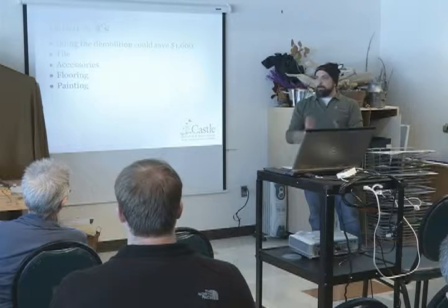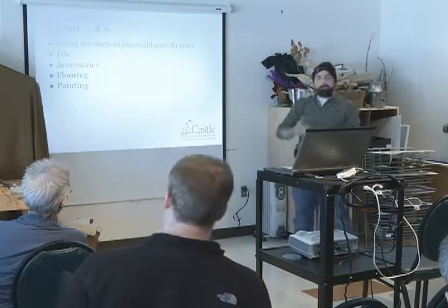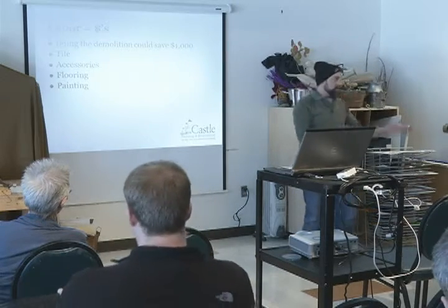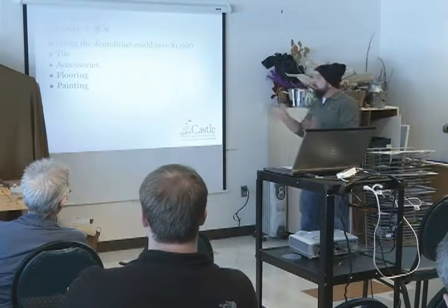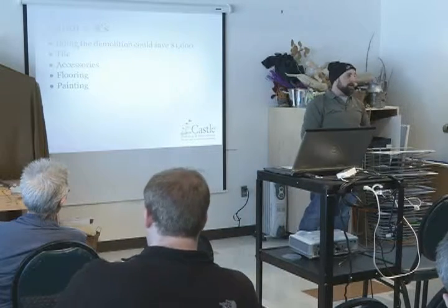We'll kind of go through the rules and expectations. If you're going to take over and do some tile in the middle of our work, and we have a timeline guarantee, we might have to alter that timeline guarantee, either stop it and restart it, just because maybe you're going to paint for a couple weekends in a row, whereas we're there during the week. The other thing that we look at on shared labor is just making sure that we understand where the warranty lies.